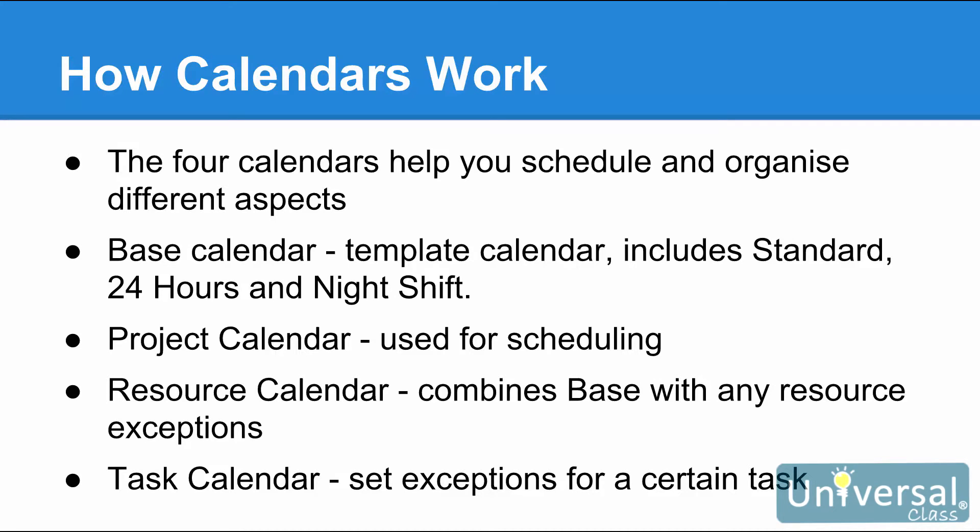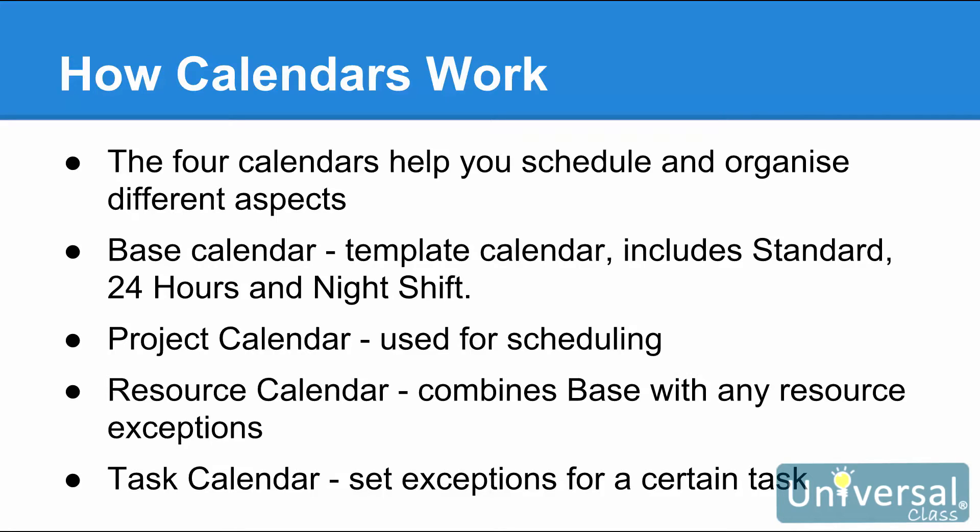The four calendars project gives you help you schedule and organize different aspects of the project. Also, the four calendars interact with each other to help you manage even the smallest aspect of the project. The base calendar is the template calendar that all the other project calendars are built from. There are three base calendars: Standard, 24 hours, and night shift.